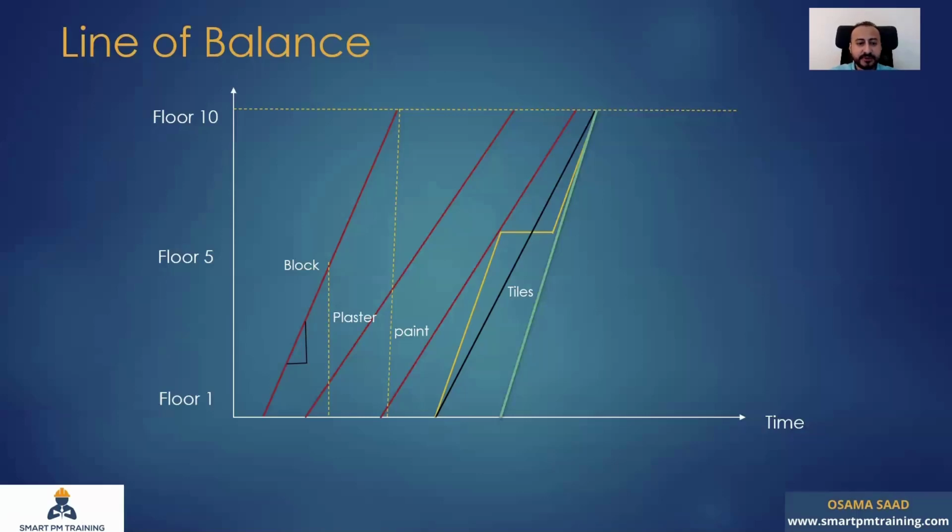Maybe you have limited painters, for example. So you're going to have only 3, but you have a bunch of masons. Maybe you have 10 masons available. You have rich availability on site for masons. Because you have so many masons, you're going to finish the floor in 3 days. So at floor 5, approximately, you're going to have interruption. A lot of masons are competing with the painters right now. So what will happen is you're going to wait, right?